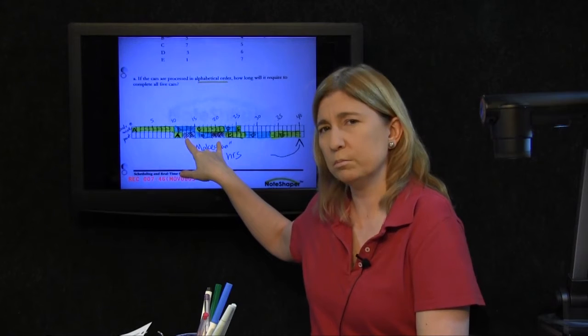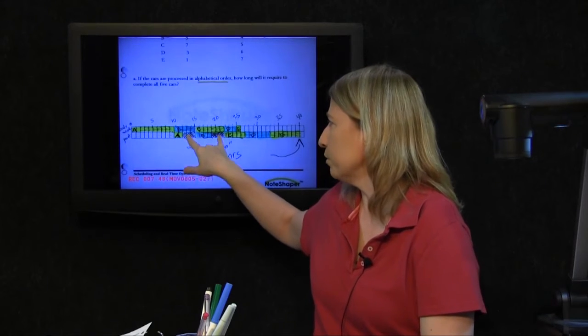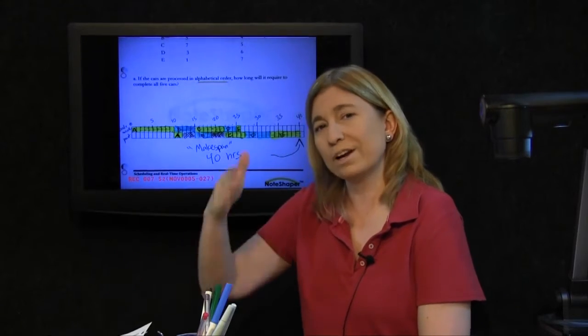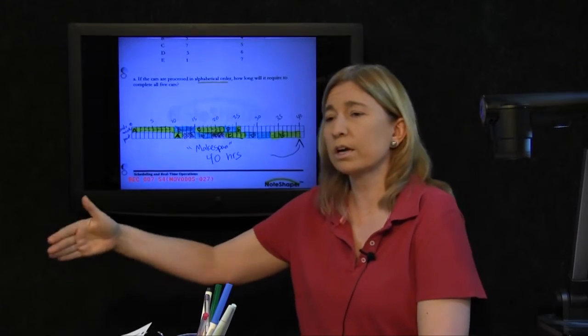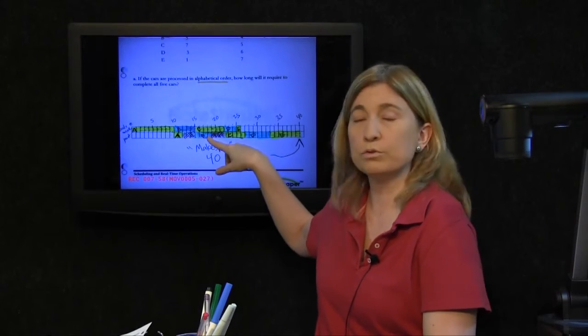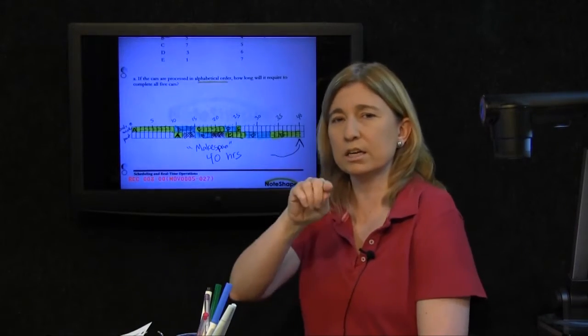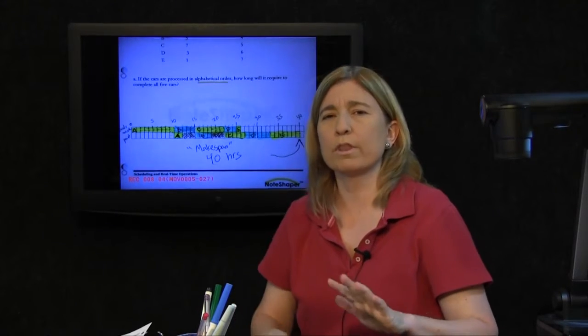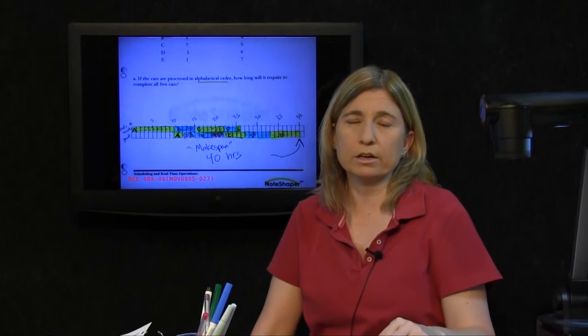That's kind of the tricky bit in here, is that be really careful when you are plotting first one stage of work and then the next stage of work, that you don't start the next stage of work too early by stacking it in behind the last requirement. Okay, just stay alert for that. It's a very common mistake otherwise.